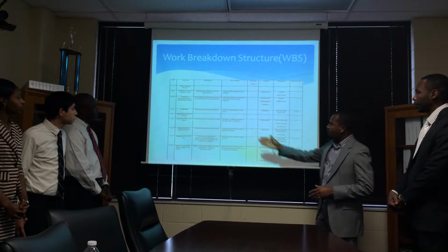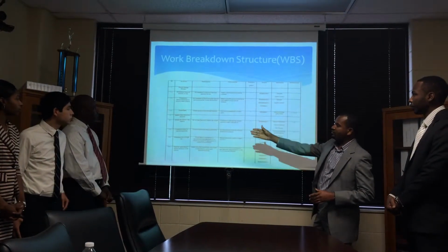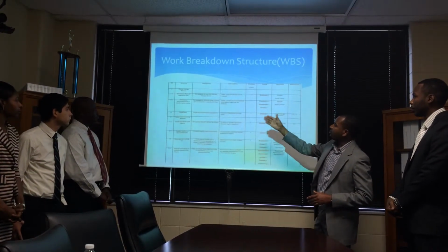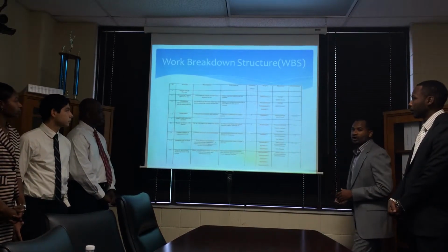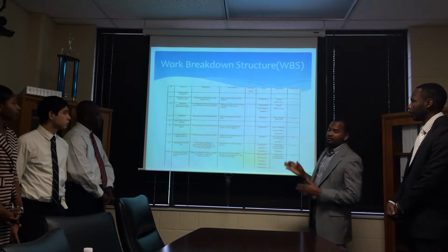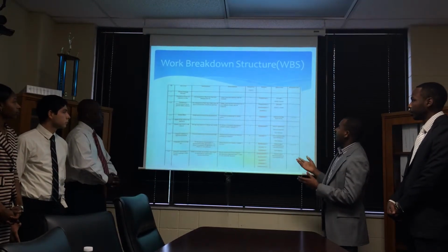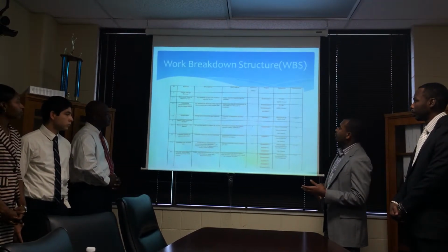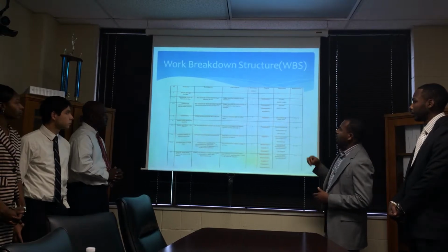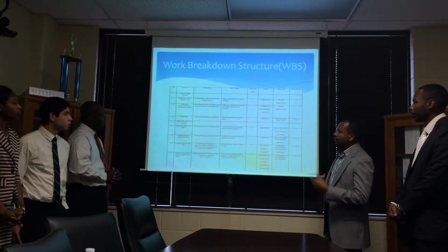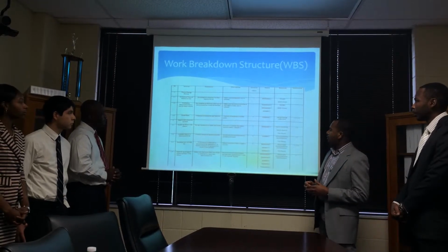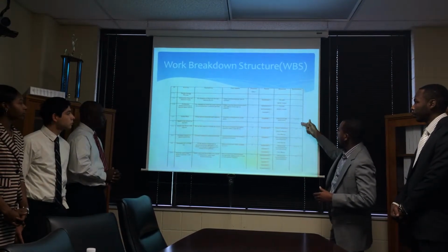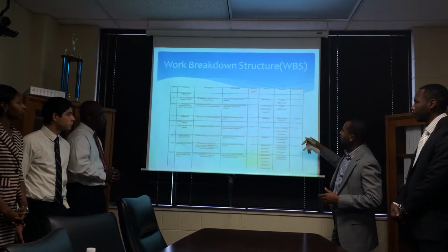First, we have our activities that we identify, and then we describe each activity, and then we assign a person who is doing the activity, and then we estimate the number of days or the time required for the activity to be completed. Also, we include the resources you need to use in order to complete those activities. We also try to make the connections between those activities.